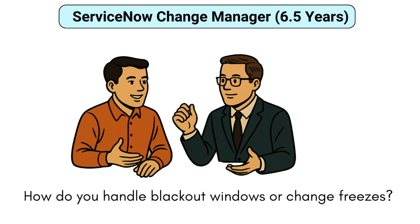How do you handle blackout windows or change freezes? Okay, so blackout windows are planned periods — for example, financial year end — where no changes are allowed because the teams are already busy and we do not want to cause any disruptions. So no changes are allowed to reduce the risk. I plan such calendars in advance and coordinate with the business units to ensure critical changes are done outside those windows. Only emergency changes are allowed during the blackout windows.